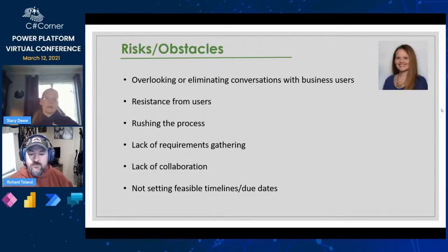Especially depending on the time frame that it would take to meet that requirement, be able to identify what you need to do now to cause the least amount of rework for anything future. But also, once you have your requirements, don't let things continually be added. That's what the backlog is for. That's what the next phase, version 2.0, is for. So you have to make sure you have a nice balance there.